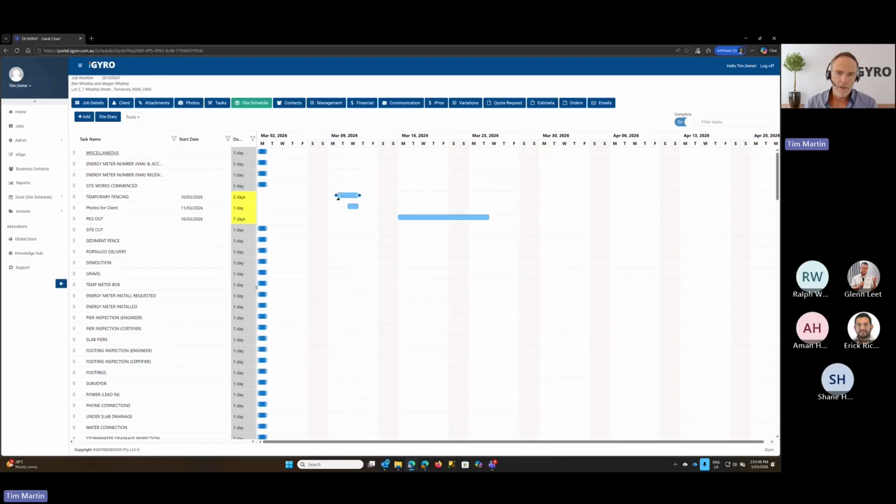But as you hover over, you'll see the dark blue dots on either side of those tasks there. So generally, when you're setting up a dependency, it's going to be finish. So the finish of this task will drive the start of the next task. So we could draw a connecting line by clicking that little blue dot, dragging. You can see that line there as I'm clicking and dragging that to the start of the next one, dropping that on, and it's drawn a dependency between those tasks.